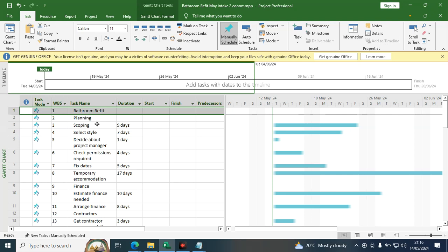So the next step that I want to take you through is to separate what you call the major activities and minor activities. So anytime you get a question, or for example, if you are not given the duration of a certain activity, it simply means that there are sub-activities, and the sub-activities will form the total duration for that particular phase.